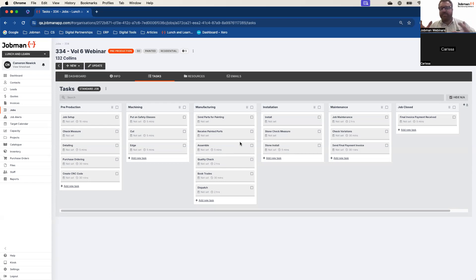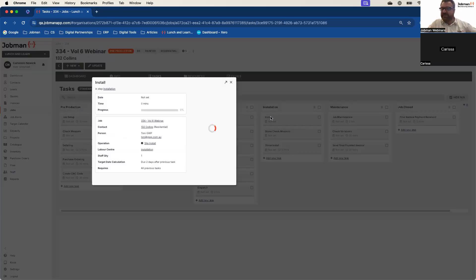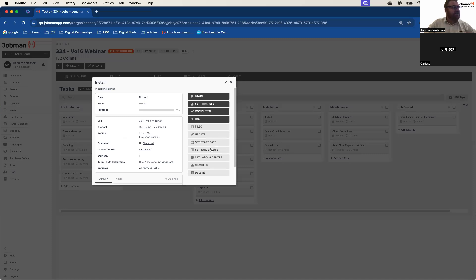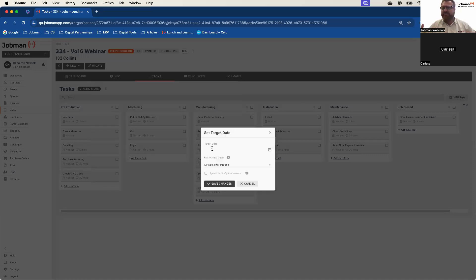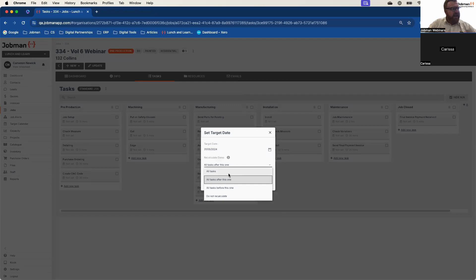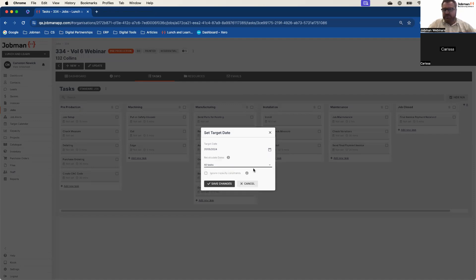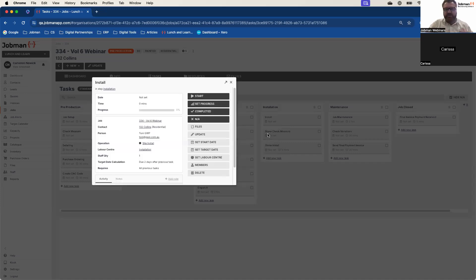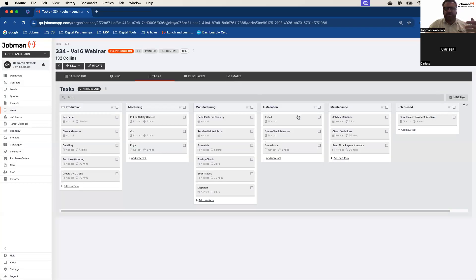The second way that JobMan manages dates — target dates — are mostly used for job management. The advantage of target dates is if you have an operation that has a lot of time. Let me show you live quickly. Let's imagine I didn't do a quote and I have a job that's going to be 24 hours of install, and I only have one person available for that job. In my capacity settings, one person is equal to 7.36 hours a day, which means in theory this job should take about three and a half days.